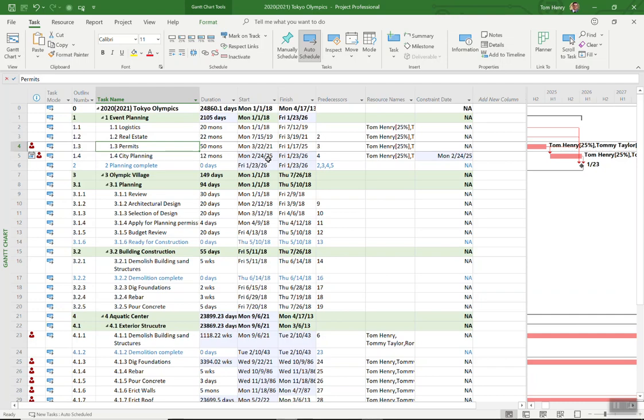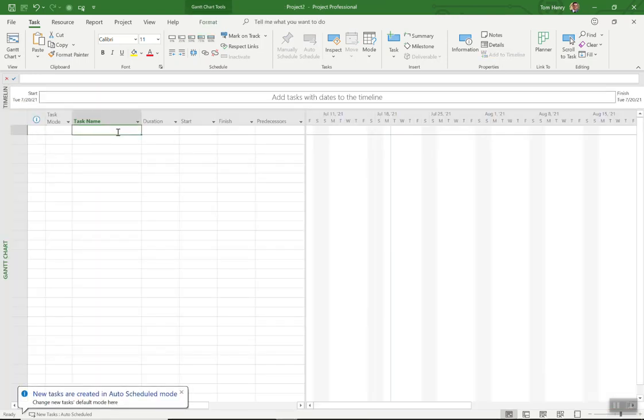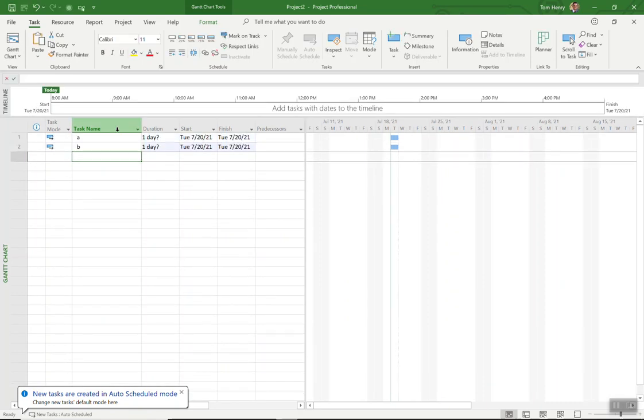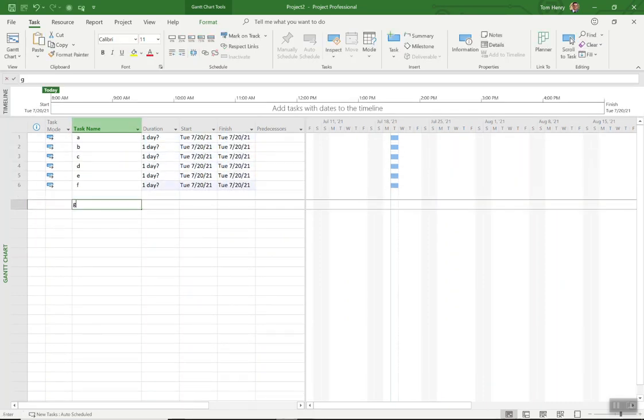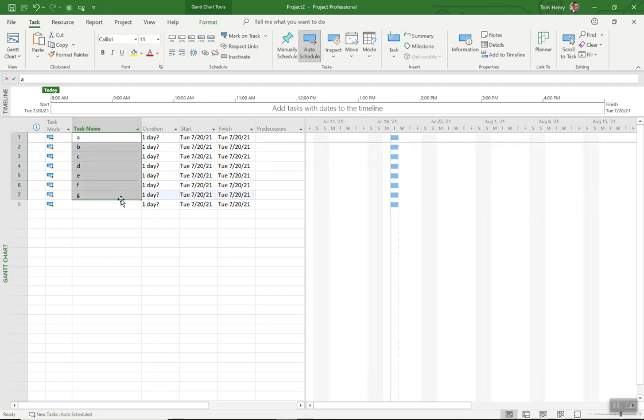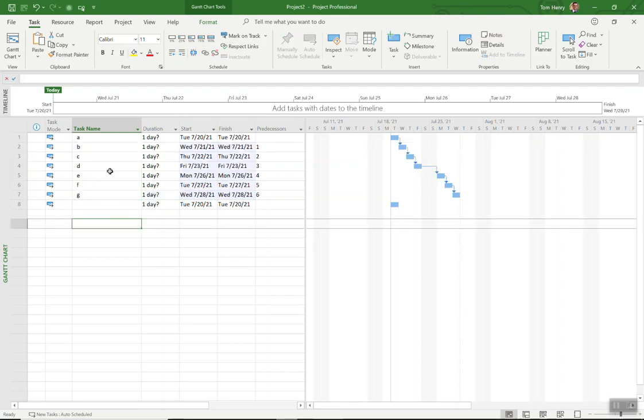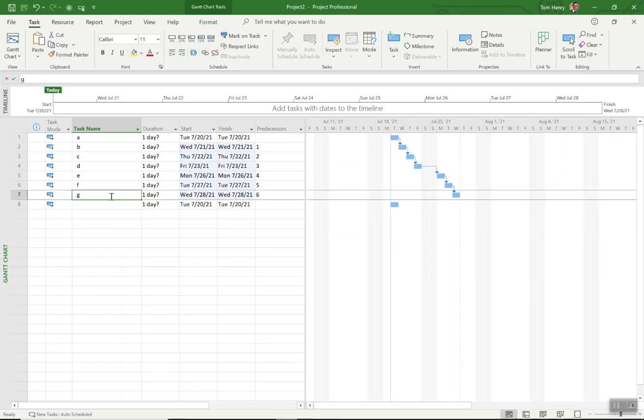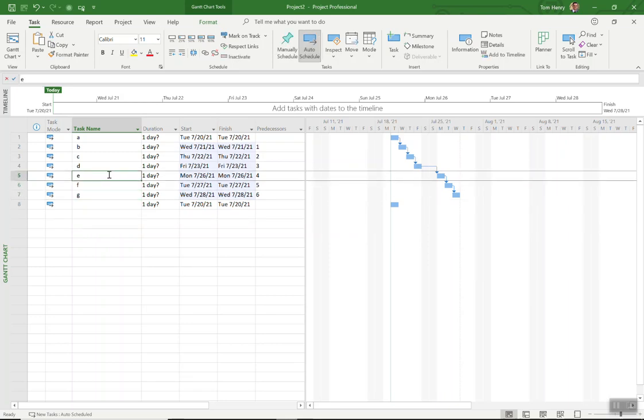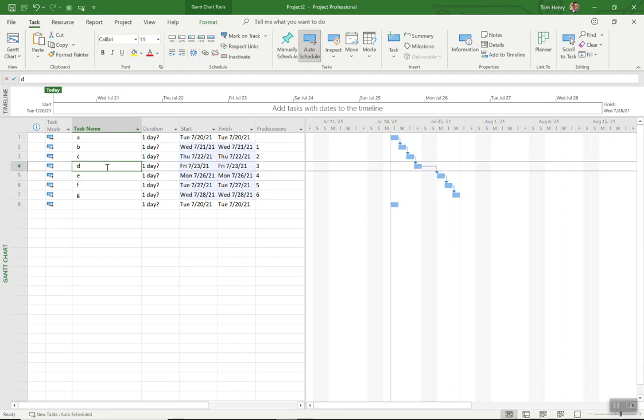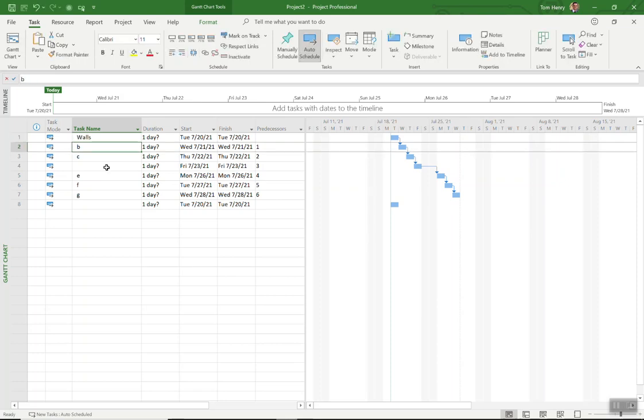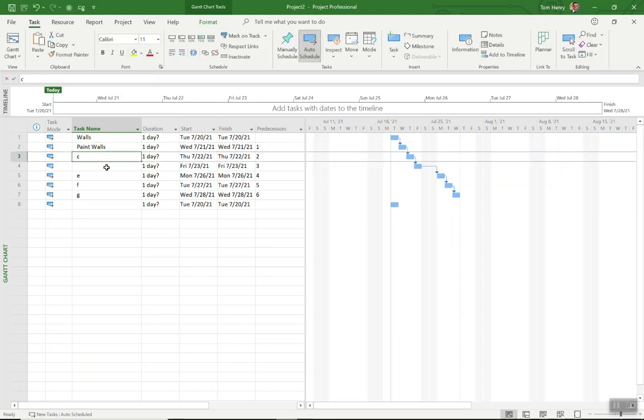Next thing, linking your tasks only where a true dependence exists. To make this really simple I'm going to create a new schedule here, I'm going to put task A B C D E F G. To link your tasks together you can just come in, link them, very simple. But what you shouldn't do is link two tasks together if there's not a true dependency. So if F doesn't actually require E to be completed you should not just link it to make your schedule flow nicely. Really think about it.